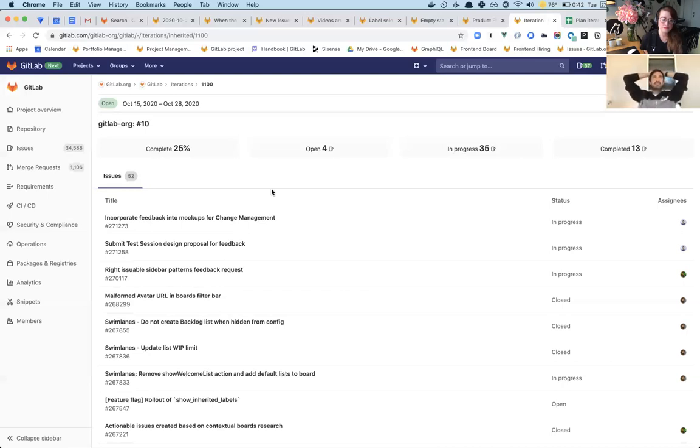Yeah, it's a lot easier to adjust if we need to. So ideally, every release, you're producing stuff that you can release to customers. With a month-long release, that's building a lot of stuff to get in for that month, and then we show it to a customer. And if we had some incorrect assumptions or we need to change something, it's another month again before we have to change anything.